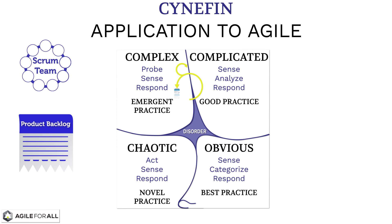The sprint review and retrospectives then allow us to sense whether we got the desired outcomes from that experiment, with amplifying or dampening steps captured as changes to the product backlog — the output of the sprint review meeting — and system improvements, the output of the sprint retrospective meeting.